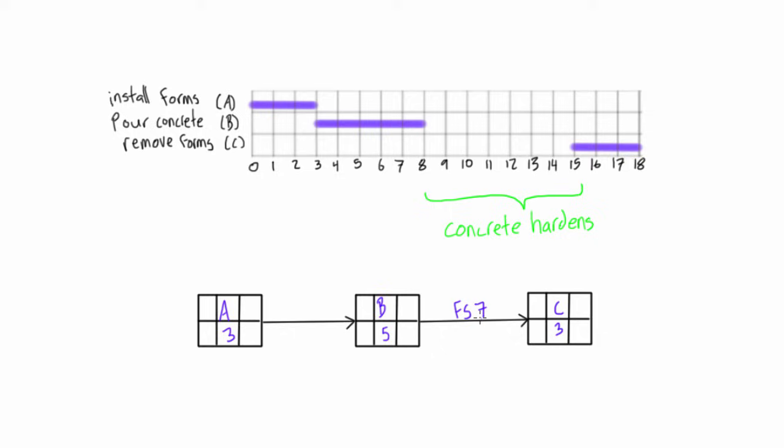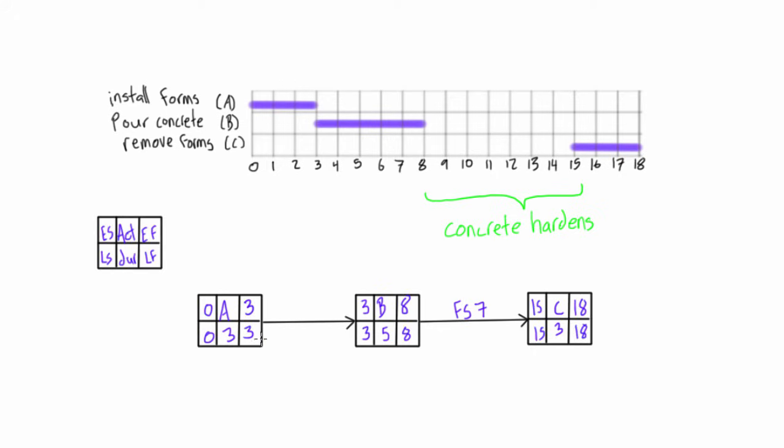And if you want, you can just go ahead and fill in your early start and early finish for each of these. And you would notice that because there is only one path of this project, the total float and free float for each of these activities would be zero.